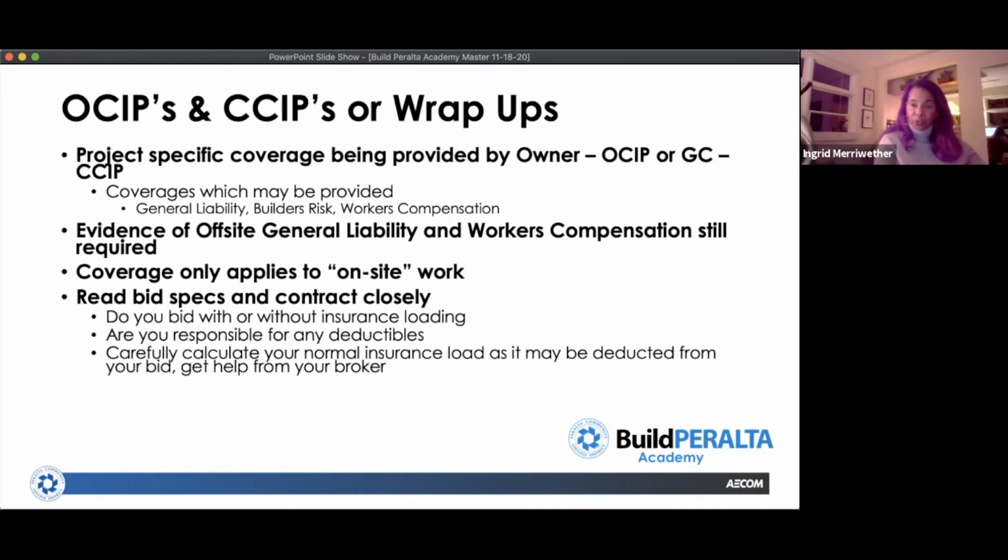So let's just say builder's risk coverage, and you're the welding contractor, and there's a fire that's deemed caused by the negligence of a person doing some welding work, and it's a $250,000 claim. They might make the contractor who was doing the welding responsible for some portion of the deductible. And the deductible in OSIPs or CSIPs for the owner or the prime contractor who put the program in place is a minimum of $250,000. Now, they wouldn't be passing that high of a deductible to you, but that's how high their deductible is.